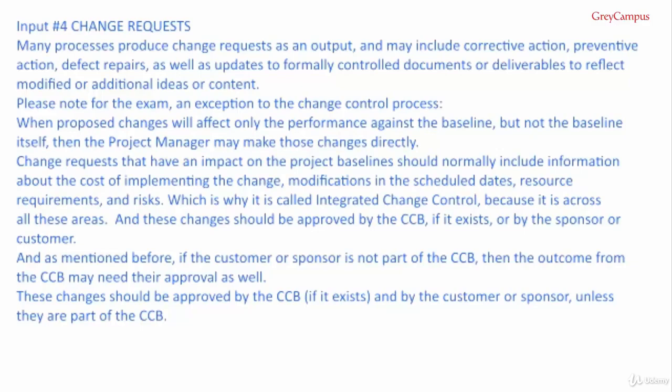Please note for the exam an exception to the change control process. When proposed changes will affect only the performance against the baseline and not the baseline itself, then the project manager may make those changes directly. So I'll repeat that. When proposed changes will affect only the performance against the baseline and will not change the baseline itself, then the project manager may make those changes directly.